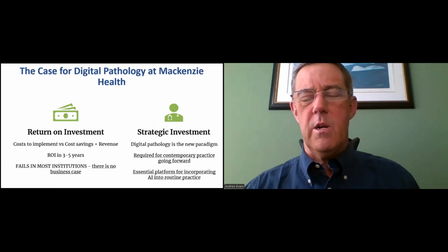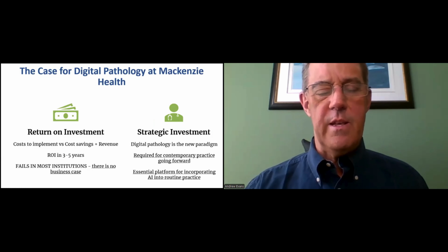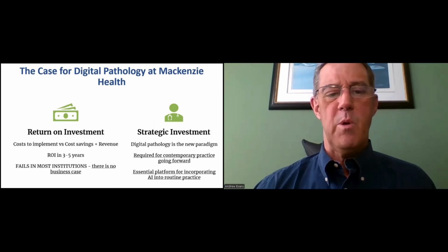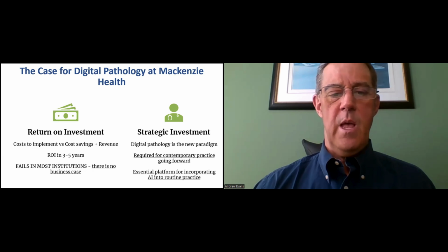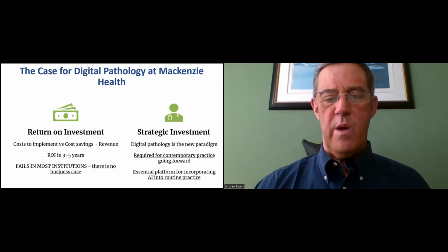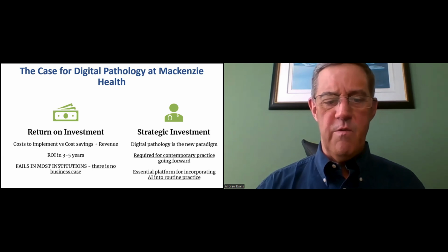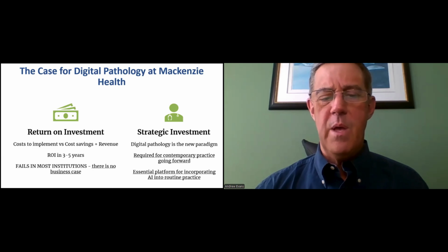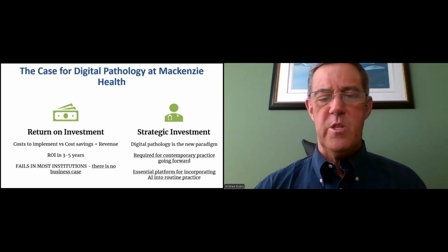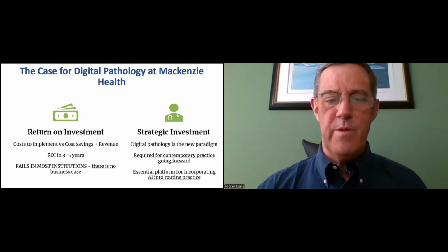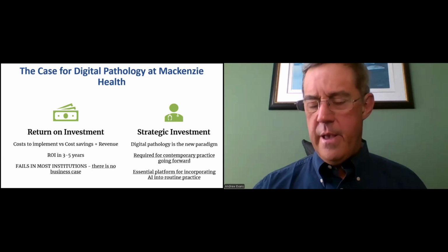The case for going digital at Mackenzie Health, I think it's a unique situation in that as opposed to approaching this from a return on investment perspective, where you look at the cost to implement, how much revenue you might generate, how much money you might save, and looking for a return on investment in 3 to 5 years. If you just take this very narrow focus within the four walls of a lab, this particular return on investment strategy is going to fail as a business case in most institutions. You come to the conclusion there is no business case, it's just more cost.